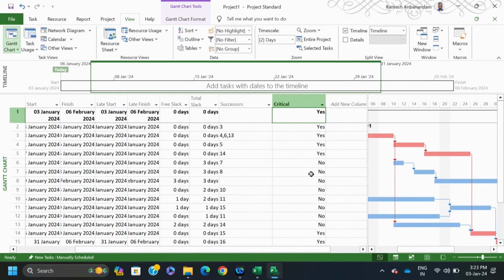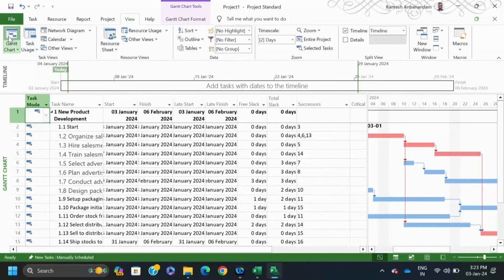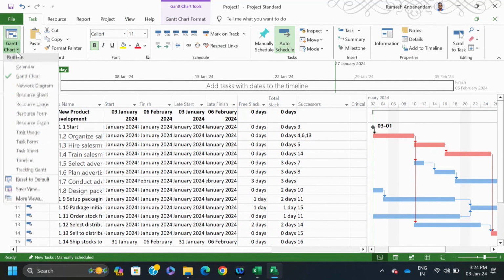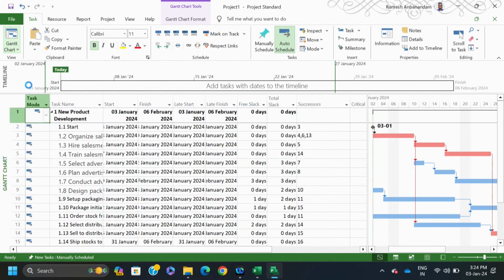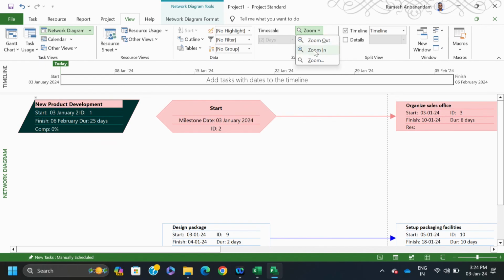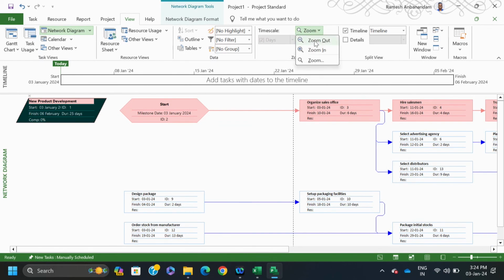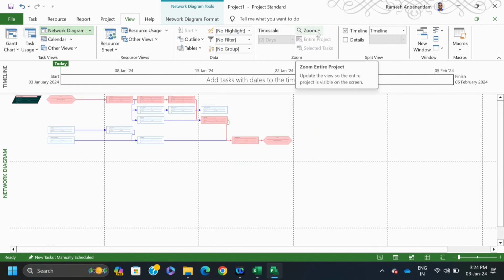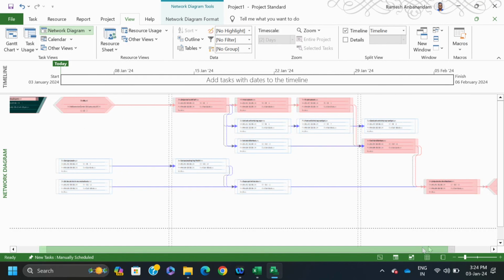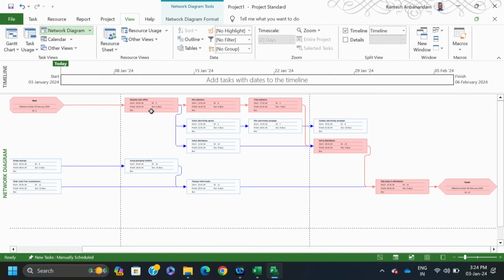Then we can see the network diagram of this problem. So, go here to Task, go here, then you see Network Diagram. Now it shows the view. Yes, this is the whole project. Zoom in. This pointed symbol says it is our milestone; Start is the milestone. Similarly, you see that at the end Finish is another milestone. The red color shows that these activities are critical activities.